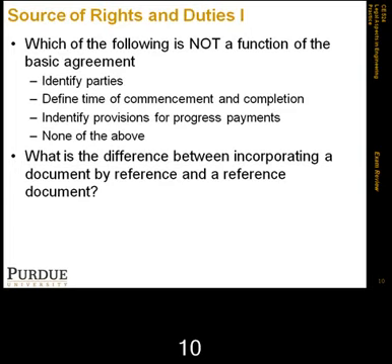We also talk about things such as our drawings and specifications. We incorporate those by reference. A reference document is something that we refer to within the document itself, such as a standard, for example, an ACI standard for concrete. We would consider that to be a reference document, rather than something we incorporate by reference in our document itself.